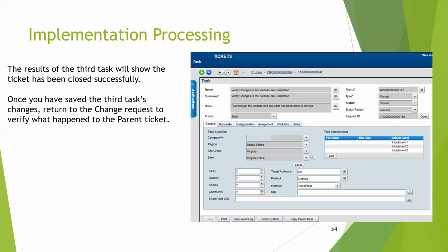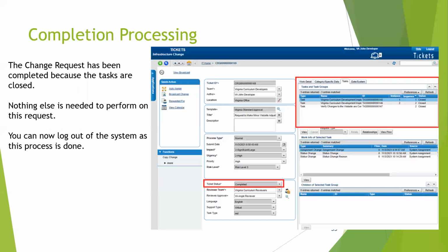Now, once we're done with the last of the tasks and we save it, you can now see all my tasks are closed, and the last task that is closed will then go ahead and move my change request to completed final review required. Now, if you notice this, it skipped that and went to what? Oh, I hit it. It's final review complete. They didn't want to see those two. So I hit those. You wouldn't know it, but they know it now because it's marked as completed. But on the back end, it's completed, final review, complete, because I don't have any closed down approvals.